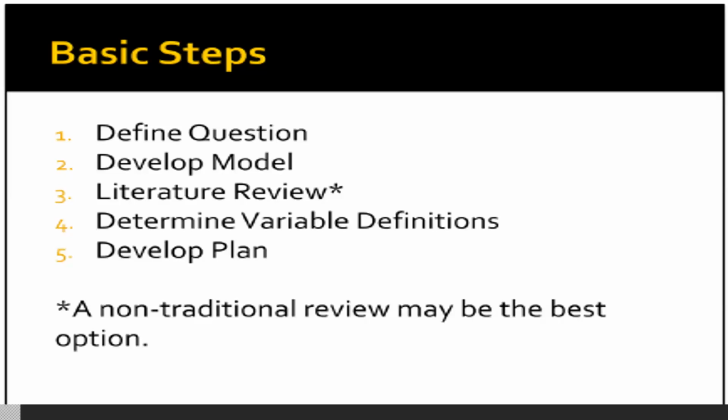Last, you need to develop the actual plan for the project. If you've had Lean Six Sigma training, this would be similar to the project charter. The difference in this case is that you also need to provide more details beyond just here is the issue and here's how we are going to attack solving it. You want to provide key details around what the need for the project is, what has already been done in similar situations, and specifically what you are going to measure and how you are going to measure it. The plan is less about the when of the project steps, but more about the why for the project. Remember, at this point, you may still not be completely certain that you are even going to be able to conduct the project.